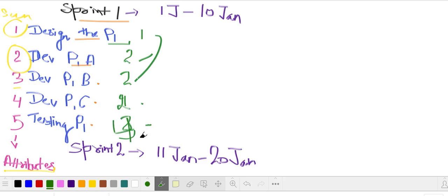Just an example. So let's see, I'm just gonna clear this up. Suppose he said 4, and I can see it's gonna be 2, 2, 2, 6, 7. So I can give him maximum 3 days, but he's asking for 4. So I have to talk to him and try to negotiate the estimates, because we want to be in a sprint. We can't delay our activities. So that's the role of the project manager.